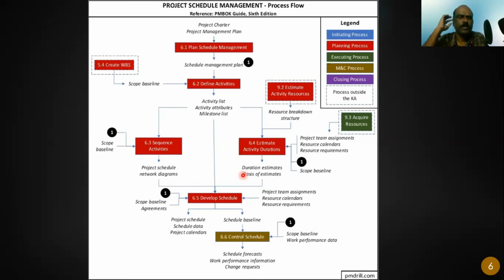In our projects, we used to call it a narrative statement, where we need to explain very clearly how we have arrived at the durations. What are the assumptions we have made? What are the sequences we have considered? What is the methodology we have considered? So normally we don't agree to just the schedule that is submitted for review. We also ask for the supporting document, which in our projects we used to call a narrative statement. PMI calls it basis of estimates.